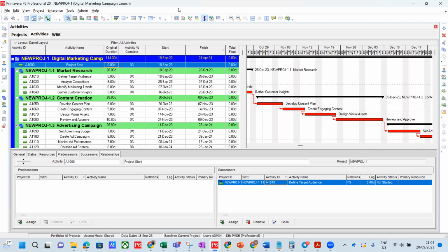So Lekon will decide, who is available? Who could I use? Okay, based on the complexity of this task, though Ade could start, I want Daniel to take over to make sure it finishes. Or Ade could start and Daniel will review it and correct anything. Or let me take Ade to a simpler job that we've got. Your company might be running 4 or 5 projects at the same time. Let me take Ade to that, and let me bring Daniel to work on this complex one. So that is how it works in real life.